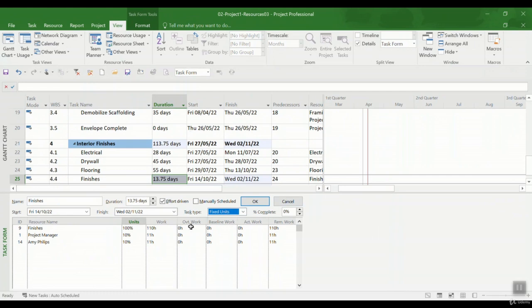So I'll put those resources, and I put an additional link for you to study and see the impact. Usually the way it works, fixed unit and effort driven together are features that you add to your task, and normally you use these. But for meetings or those tasks that I just mentioned, be cautious not to use effort driven.